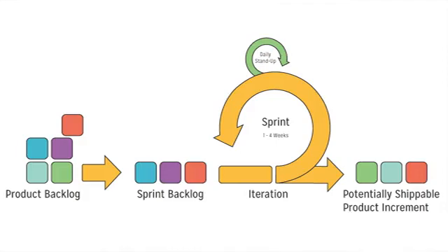During the sprint, no changes can be made that will affect the sprint goal. The sprint goal is the big picture view of what is going to get done that sprint. Suggestions that will change the sprint goal will go in the backlog and can be implemented in the next sprint if that's what the product owner decides.